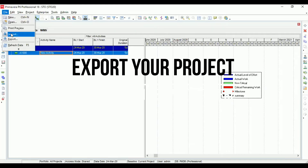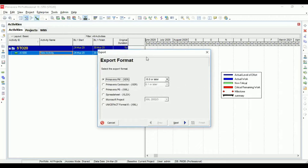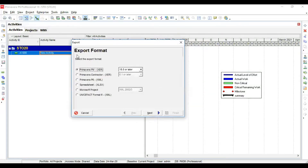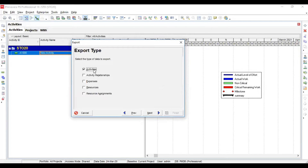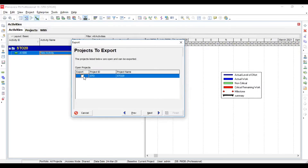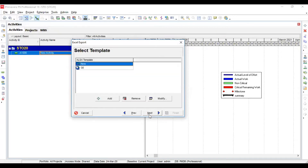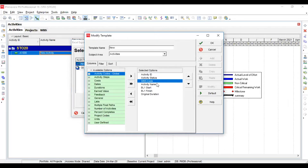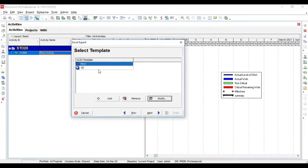The second step: go to File and export this project. Click Export and tell Primavera 6 that you want to export in Excel format. Click on Spreadsheet Excel (.xlsx), then select activities to export, click Next. Primavera 6 will provide different templates which are combinations of different columns. Click the Modify button to see what columns will appear in your exported Excel sheet. You can also generate your own template.